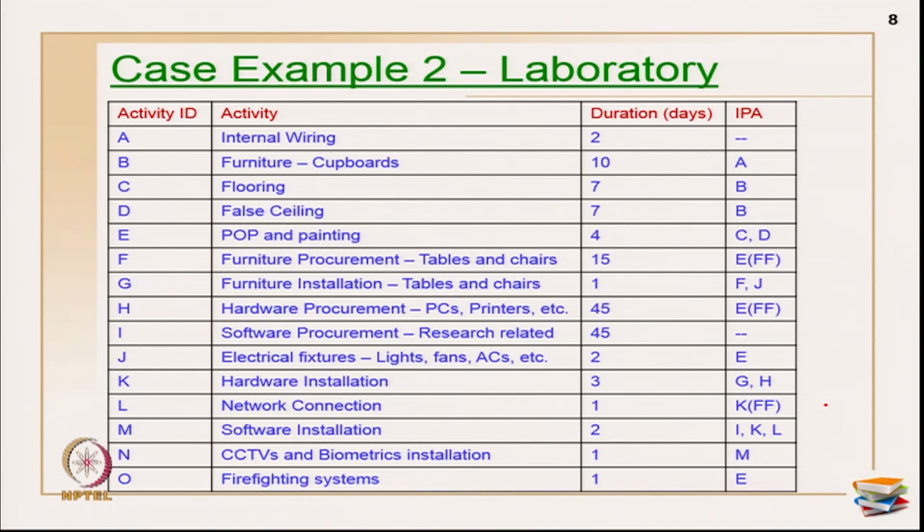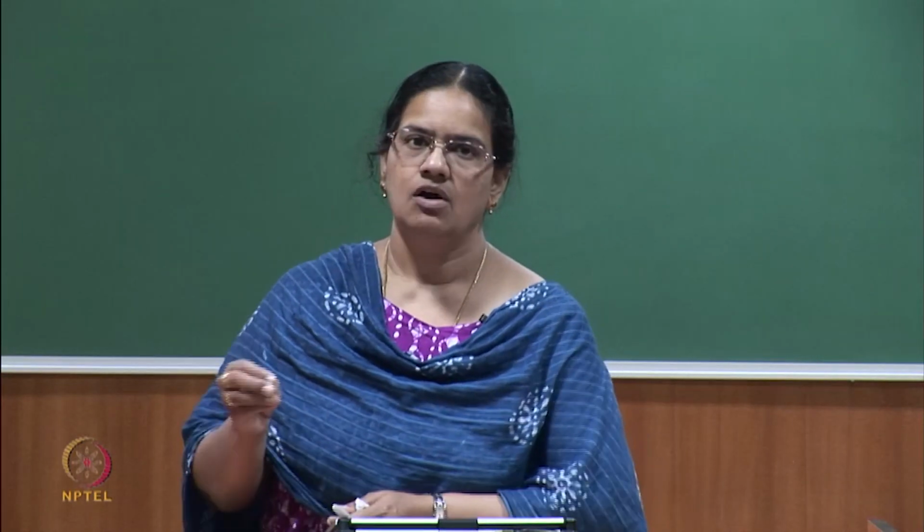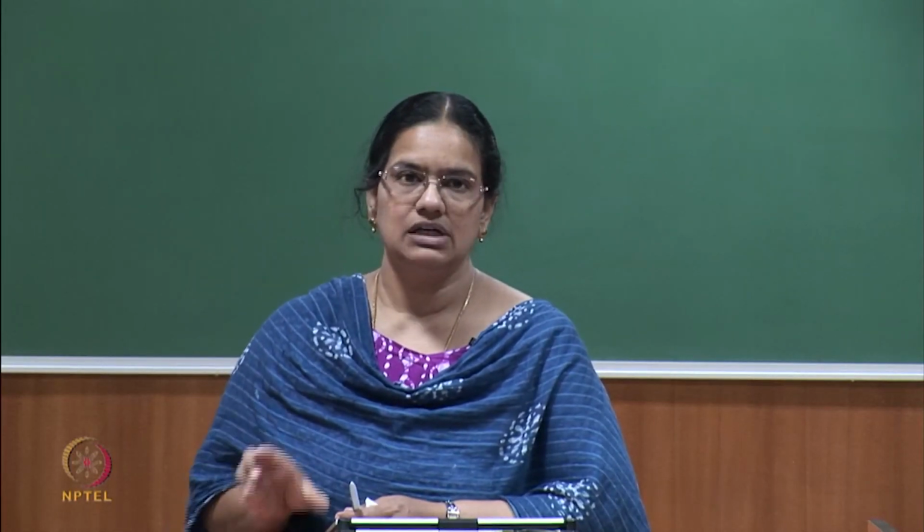So, that is how the relationships start filling up after you make all the decisions on the activities. So, the logic is, okay, let me go a little backwards. The logic is, first you go with the levels, break down the project. As and when you start breaking down and moving ahead, you get more and more information on the assumptions, what has to be done, the real scope of the entire work on each activity gets defined, and then you go on in the levels.